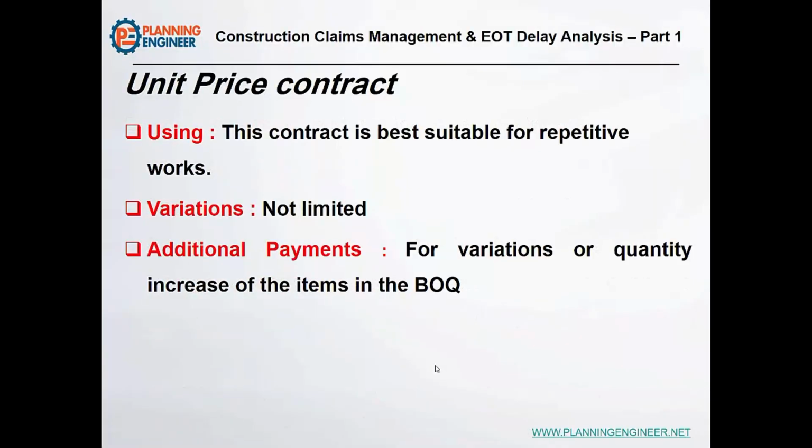This contract is best suitable for repetitive work and where the variation is not limited. Additional payments can be made according to the increase of the BOQ quantity. This type of contract is associated with high risks to the client but low risks to the contractors.